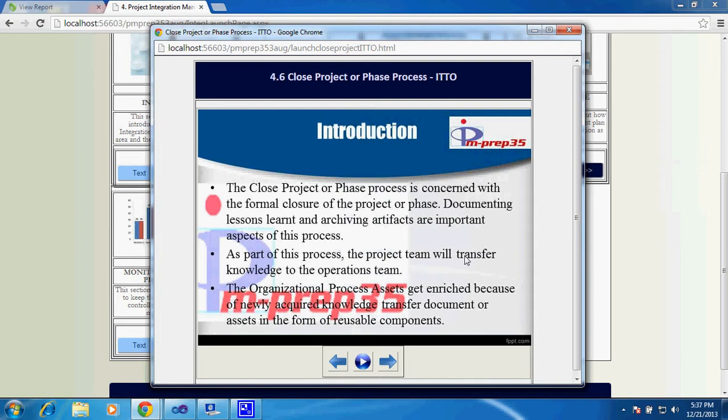If a project gets terminated, the project manager sits with the stakeholders, who can be the project team or mainly the customer, to get feedback about their work done so far. He gains the feedback from the customer and ensures that this document is archived, so that in future, when some other team or project manager wants to look at any experience with this client, he should be able to retrieve this document and perform better with that client. That's one of the reasons why you collect feedback and document lessons learned.